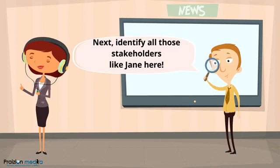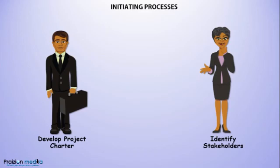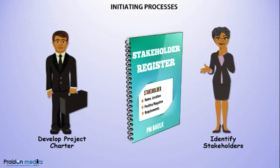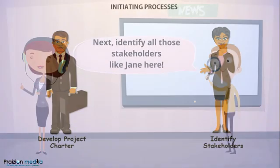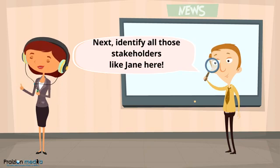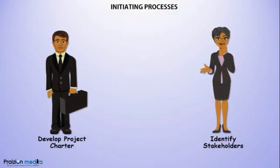The next process is Identify Stakeholders, where stakeholders are identified and analyzed. This is not a one-time event — it happens all throughout the project. The major output is called a stakeholder register. As part of analyzing stakeholders, the project manager should look at their level of power, level of interest, level of influence, and determine their attitude — hence the stakeholder grid that analyzes their attitude, power, and interest.